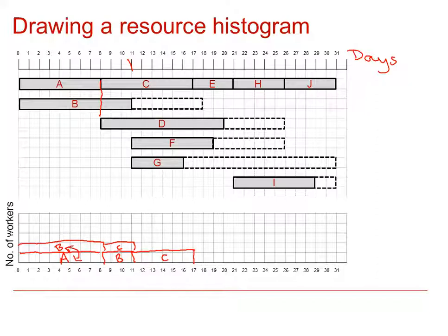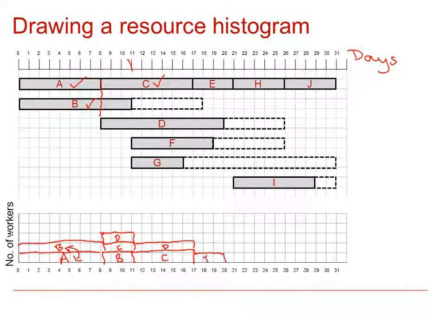It doesn't matter where you draw your activities; what matters is the overall shape of the histogram. I could have drawn B at the top and C underneath if I'd drawn C first. So we've done A, B, and C. D also starts on day 8 and goes on to day 20, so I'm going to draw D next. I've got to stop at 11, then go down to the row below, D continues at 17, then go down to the row below again going to 20.